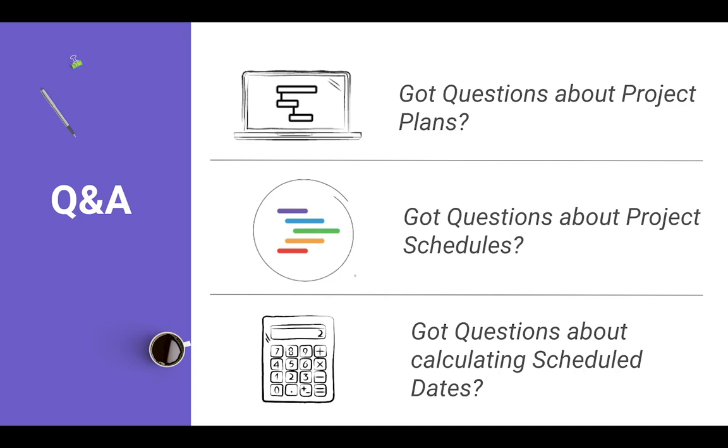You can turn it off and then nothing will auto start, whether tasks are dependent on one another or not. The other two settings enable auto start, and they will automatically start dependent tasks under different criteria. So those required conditions that I referred to will come into play. So adaptive scheduling is not necessary.